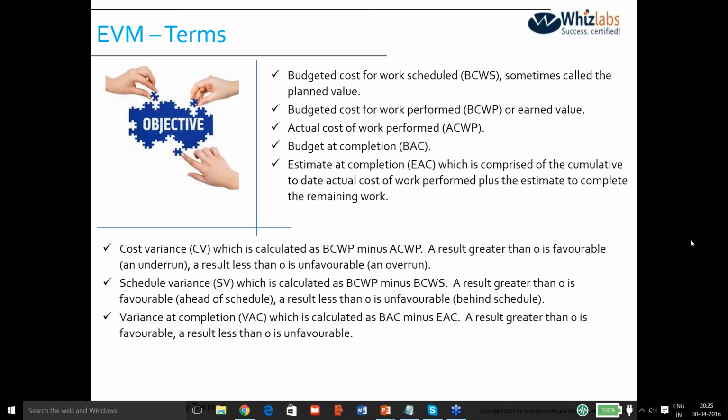As I said, we don't use earned value management only at the end of the project. It is basically a periodic assessment. If I do it only at the end, the damage is already done. Because if there was some problem in the middle of the project, but I didn't do any assessment, you can't look back. There is no other way to salvage that damage. And that is where EVM comes into the picture, so that we can do periodic assessment.